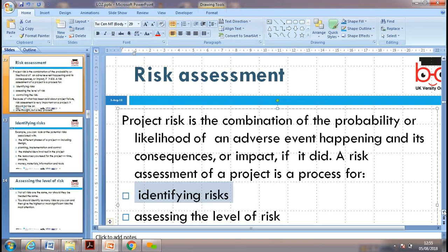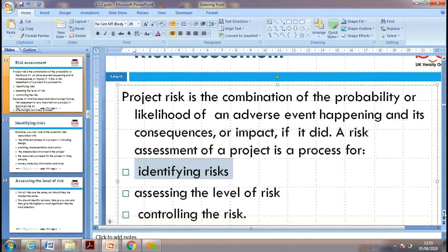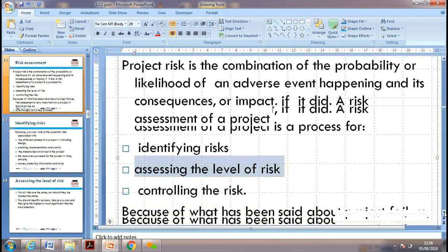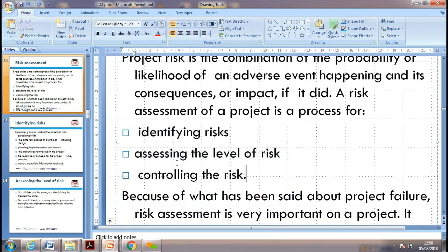In terms of project health and safety, we need to look around. Are they wearing helmets, do they have gloves? If they don't and anything happens, that could be a risk: people can lose their lives, or hands or legs can be broken. So we need to assess the risk. Some jobs have no risk or very little risk. Some jobs are very, very high risk, like electricity plants, where engineers work in darkness, so they are supposed to wear reflective jackets, to control risk.